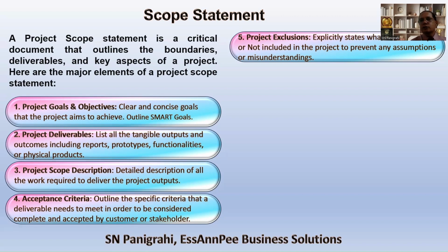So it is very important to write down the exclusions very clearly. Otherwise litigation happens. In this case, the litigation arguments are going on because of things which are not specifically mentioned in the contract or the scope of the work. So whenever you are defining the scope, the inclusions and exclusions are supposed to be mentioned very explicitly. What is included, the activities we are supposed to do, and what is excluded, meaning those are not part of the scope of the project. So that is the importance of the exclusions.